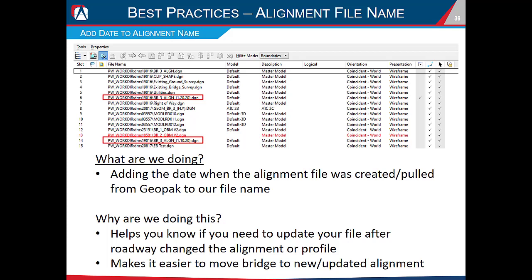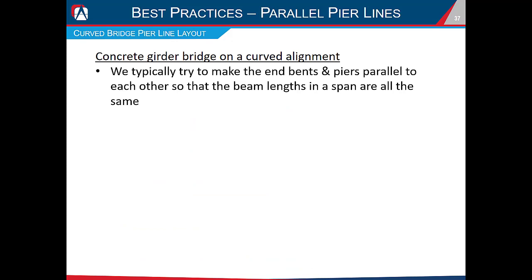Another best practice — especially useful in early project phases or design-build projects — is to add the date to the end of the alignment file name. The date should reflect when the alignment file was created and the data was pulled from the GeoPak file. This helps you know if you need to update your alignment file after roadway changes the alignment or profile, and makes it much easier to move the bridge to an updated alignment.